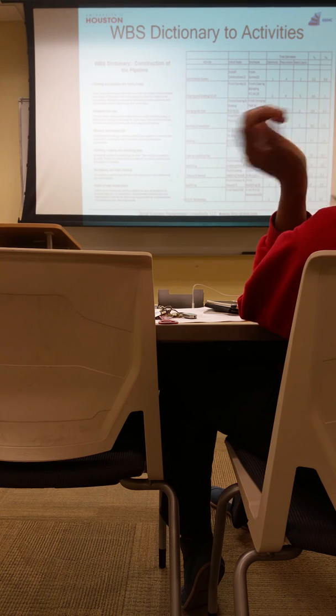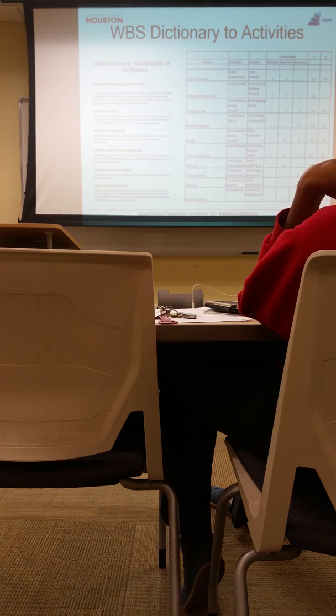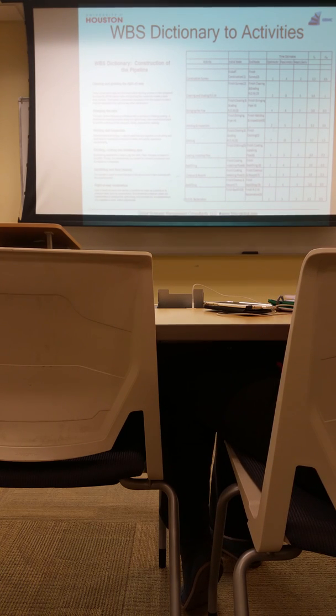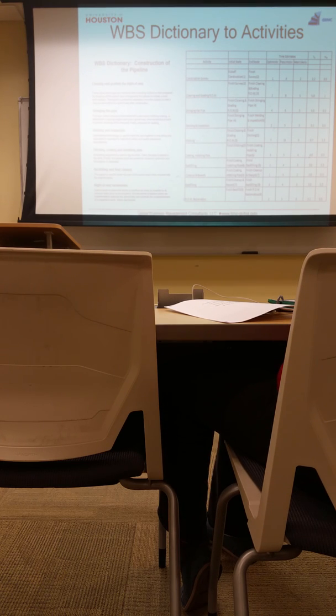Kind of like the weakest link in the chain is how weak the entire chain is. Well, the longest sequence of activities is the shortest time that you can finish the project. There are going to be other activities going on at the same time, but some of those are actually going to be finished and stopped before you finish this long sequence of activities. And the difference between when those other activities stop, or you've got people standing around on that leg, and the overall finishing of the longest sequence is called the float on the project.